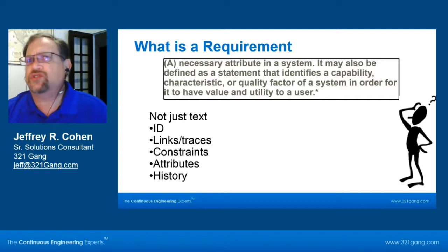By the way, this trace also helps you when you're trying to bid or estimate a project too, because over time, if you keep metrics associated with every change and how big it is, you can start doing things like saying, well, if this requirement changes and it affects 3 use cases, 2 classes, 5 tests, and I know, rule of thumb, approximately how much effort it takes to make those changes, you can get a pretty good estimate over time to know how long an individual change will take.